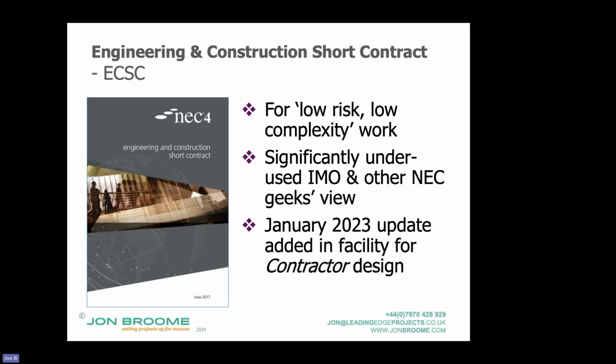All right. So if I change my mind and start wanting you to do something else, it's got to fall under one of these bullet points in terms of what you get paid. Here's how much you get paid extra. So don't just give me a bill at the end of the contract and expect me to pay it. I'll expect to know about it at the time, and I'll expect some sort of breakdown in accordance with this clause. And as I said, the builders who didn't run a mile basically said, oh, I actually quite like this because it gives me some confidence that I know I'm going to get paid for these changes if they occur.